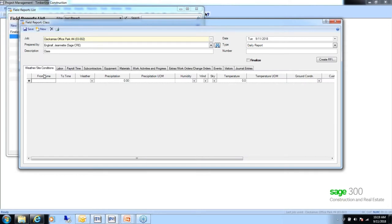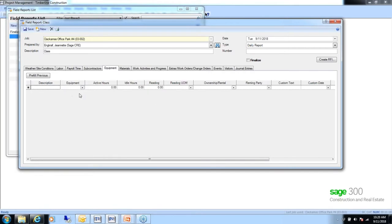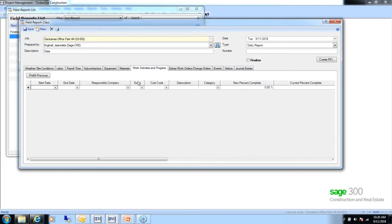There's also a Labor tab where a field engineer or project manager can fill in employee time and hours worked for reporting purposes — however, this does not interface back to payroll. Other field report tabs include Weather — manually entered — Subcontractor for recording hours and headcount, Equipment for what was in the field, and Materials, which could come from a purchase order. Sage developed these by consulting with companies about what they needed to track.